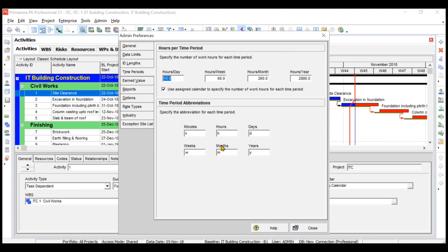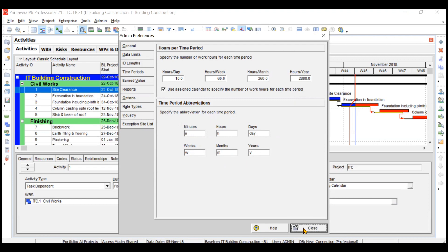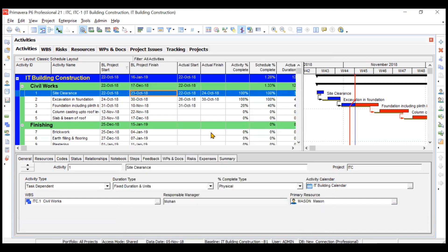See, month and minute both start with M, so by default it has given N to minutes and M to months. You can change it. Like for day, if you want, you can make it D-A-Y and so on. When you close this, it will get reflected. I'll show you. Just close this and see in the duration.